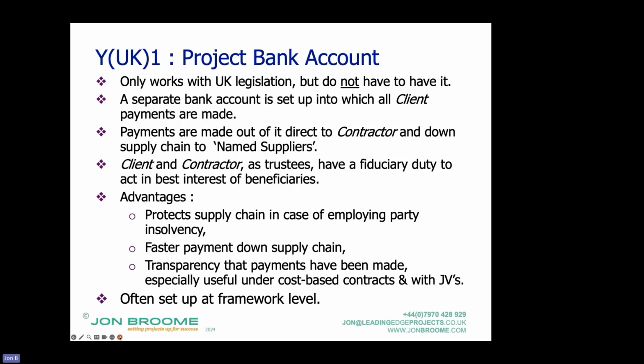And by that, I mean, I'm a client. I've selected you under a framework. I have 5 years of work. Multiple contracts might be going at one time. I don't want to be setting up a new project bank account for every single contract. So what I've done is effectively move these clauses to framework level, and we've set up the bank account at a framework level.